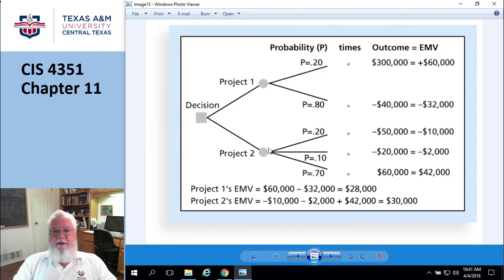Basically, what you do is, I don't really know what this thing is going to be, whatever it is, cost, schedule, time, something. And so you give it the most likely cost, and then the pessimistic cost and the optimistic cost. So you have your bracket, you have a triplet. What you expect, what could probably be the lowest and probably the highest.